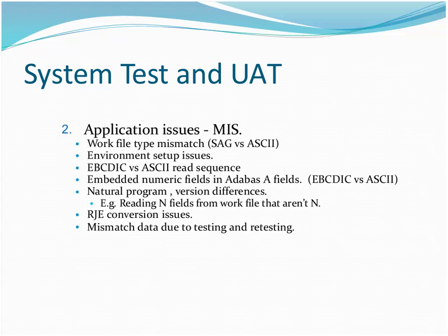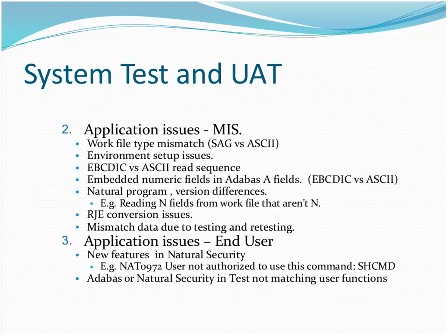And something you don't think about, but we've got all kinds of users testing, and somebody's trying to test a batch job and an online, and you just mess up each other's data. Somebody runs the monthly job and tests it online, and it's different. So we ran into problems with having people testing over and over. That wasn't a big deal, but it did come up.